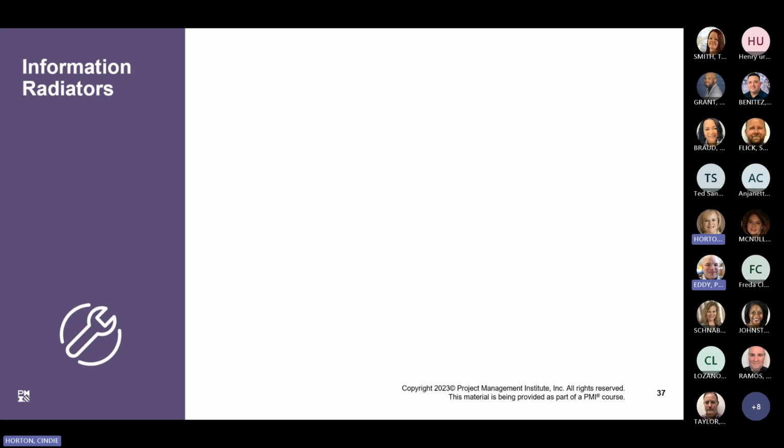So an information radiator is simply a visual display that presents key project information in a highly visible location, ensuring that all the team members and passersby can see the latest updates at a glance. And these displays can be handwritten, drawn, printed, or electronic, and they often include details like the count of automated tests, velocity, incident reports, and continuous integration status.